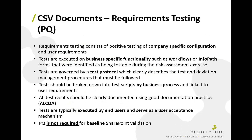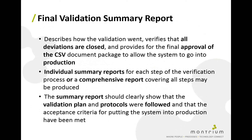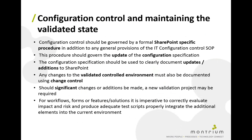As soon as you start deploying applications on top of the baseline, you will need to do PQ. Once we've completed all testing, we need to write a validation summary report. The report describes how the validation effort went, verifies that all deviations have been closed, and allows us to approve all CSV documentation and put the system into production. You can produce individual summary reports for each testing step, or a comprehensive report at the end — we typically prefer a comprehensive report. The main goal is to show that the validation plan and protocols were followed, and that acceptance criteria for putting the system into production have been met.